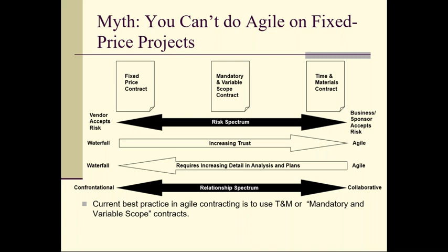And then I estimate my variable scope items. We put them on a list, which in Agile we call the project backlog. We put them on a list and we estimate their size and complexity, most often using a technique called story point estimating. It actually looks at the complexity of these features. But what we're able to do with these points of complexity is start to understand the big ones, the small ones, the medium-sized ones. We're able to group them and scale them and understand how we're doing.